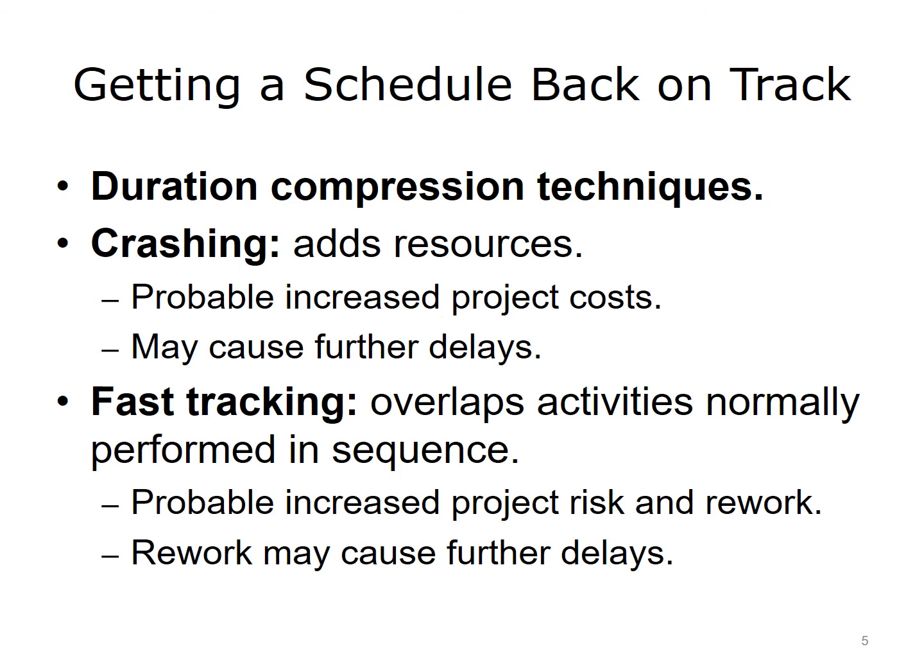Sometimes, despite all your planning, schedules get behind. Two approaches to compressing your project schedule include crashing and fast tracking. Crashing adds resources to help complete an activity on time. Crashing the schedule will probably result in increased project costs. If you are adding team members, it may even create further delays because current members will have to spend their time bringing the newcomers up to speed.